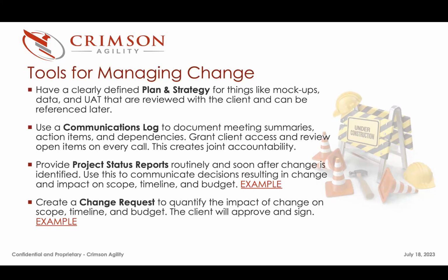And there's more than just buffering on a client by client basis. It's also because of complexity. I would imagine that Nice adds 30 to 50% to every single one of her tasks for Performance Health, compared to anything else that we would do on a regular environment, just because of the complexity and the overall architecture of Performance Health, because you have to.